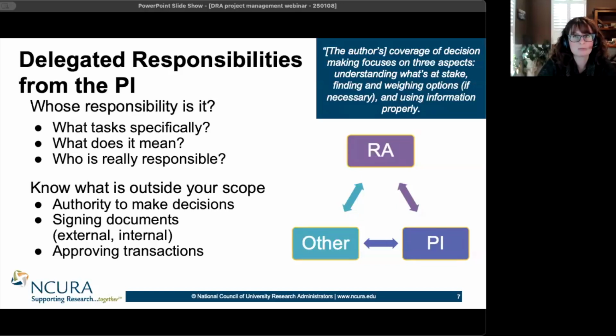Other times you may be faced with no good options, and it's simply your job to give the person who has the decision-making authority some sort of evaluation. The person making the decision may have something in mind, and it's your job just to weigh that decision against certain criteria. You may weigh that decision against cost principles. Is it reasonable, applicable, allowable, consistently treated? Or, as the project manager, you may provide a list of options with pros and cons for each.